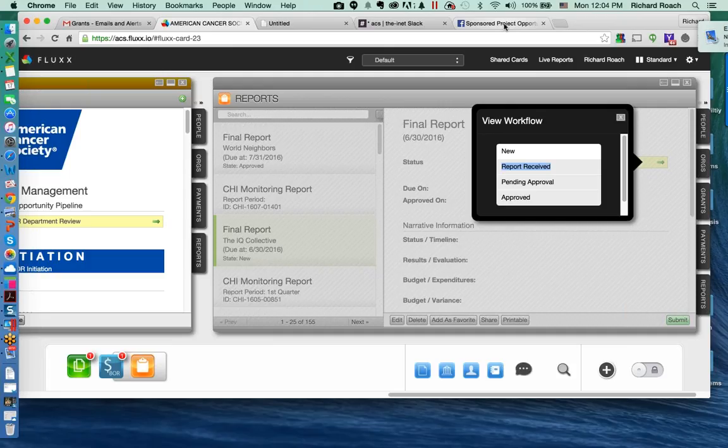Okay. When you say a cycle of reminders, Richard, just one quick consideration. Because CHI or change, we would need the same type of prompts. Justine, I'm wondering if the solution to not knowing exactly what the date will be, because all of those dates will be driven by the project timeline, is just on the front end to give the logic behind it. So 4 weeks before a payment is due, we want the alert. 4 weeks before the project report is due, the program staff needs the alert.